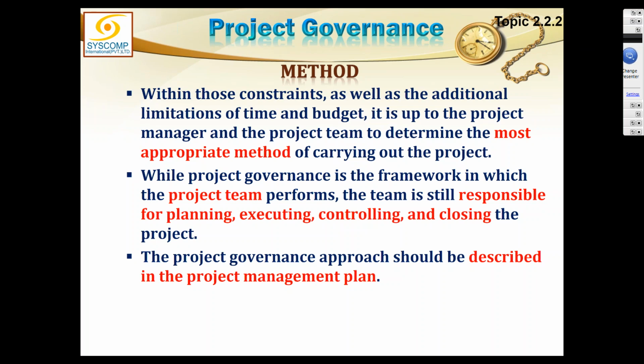So those various approaches are properly analyzed, and then the most appropriate approach is selected, and that appropriate approach is further subdivided into a certain number of phases or steps in which the project should be carried out, and this suggestion is put up to the sponsor or the project board to